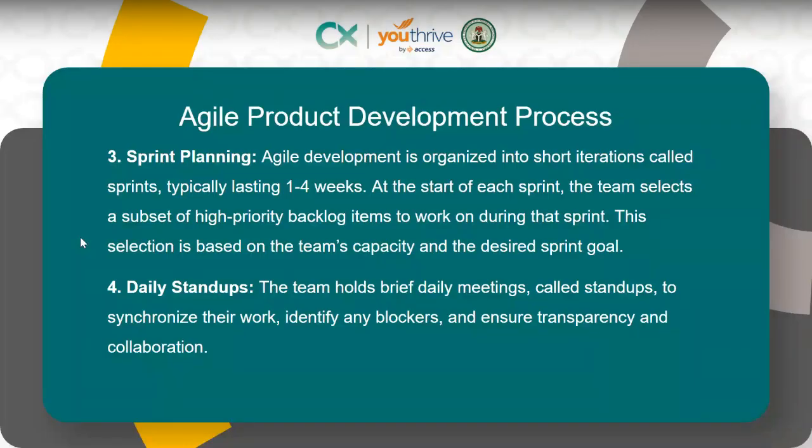So you've done that prioritization, and you then start subsetting them into sprints. Say we have about five features entering the first sprint, another 5 or 6 enter the second sprint, another set will enter the third sprint, and you then release sprint by sprint. You of course remember that diagram I shared.